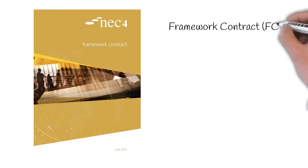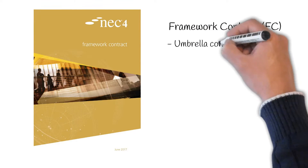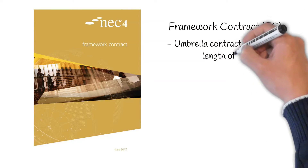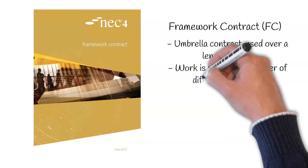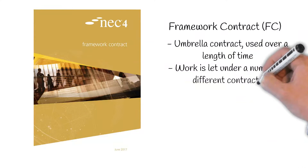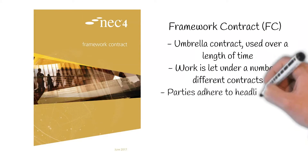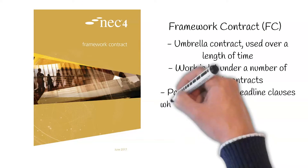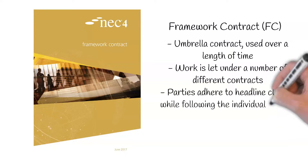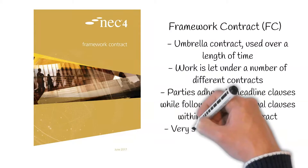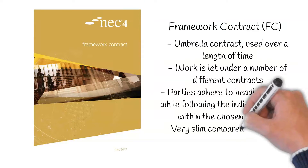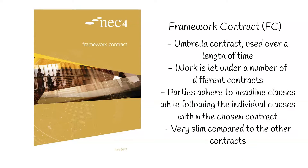Framework Contract, or FC. This is an umbrella contract which is used over an agreed length of time. Within that time, work is let under a number of different contracts within the suite. This means parties will adhere to the headline clause within the framework, while following individual clauses within the chosen contract for that package. The Framework Contract is often very slim compared to other contracts.